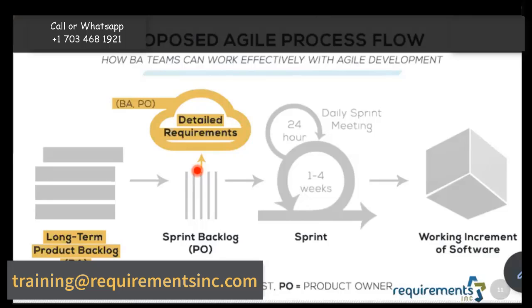Okay, make sense? So that's why as you go bigger, the gap between numbers is much higher, correct? So basically, it gives the team an indication. If it's small enough, manageable enough, then try to be precise. But if it's larger, just call it large and forget about it.